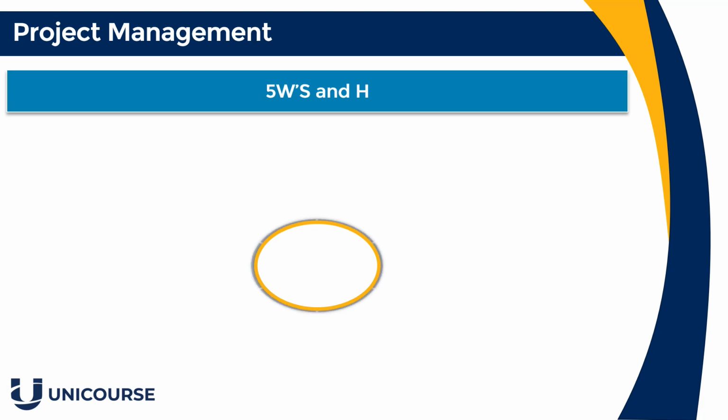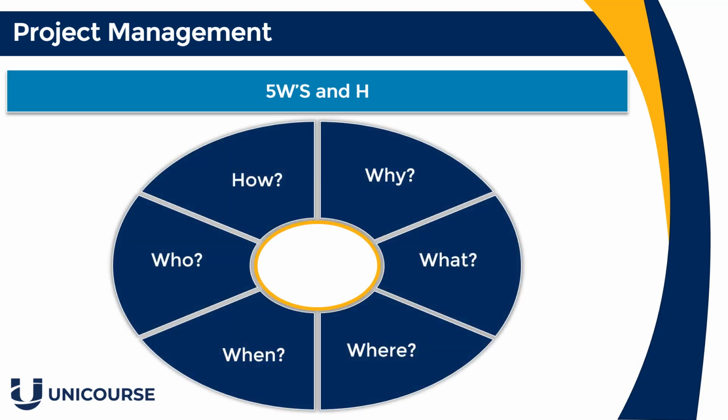One of the most efficient tools that I believe is useful in project evaluation is the 5 W's and a H. So the 5 W's and a H is a method that simply asks questions about the process or the project, and even helps to find the root cause of a problem. So an example would be, why was section B delayed? The why is sometimes even asked 5 times so that you can drill down to the core of the problem.